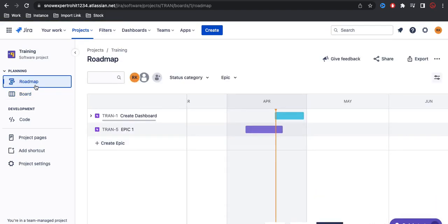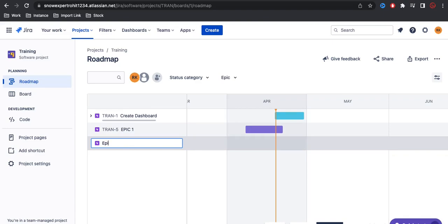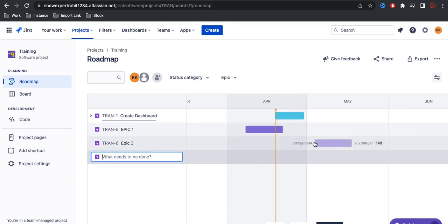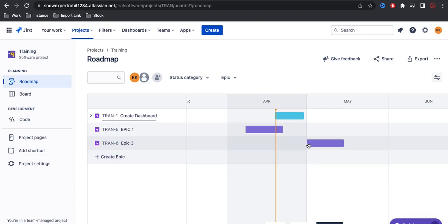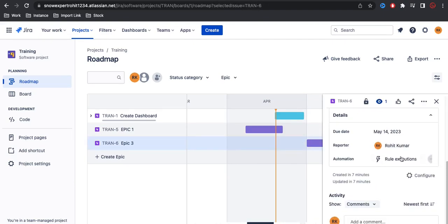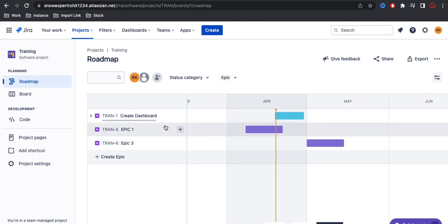In the roadmap you can directly create an epic — put in something like 'Epic 3' and click save, and it will automatically create your epic. Then you can select a time frame, click OK, and it will automatically create the timeline. If you want to update it, you can simply click and update.